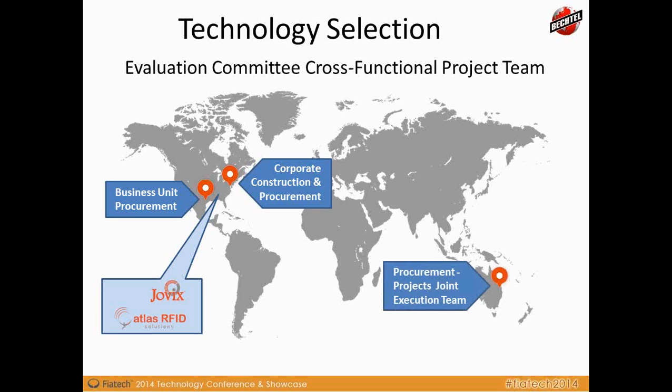One of the strategic exercises that we undertook on Curtis Island was that even though we have very distinct clients, and as you saw from the Google Earth image, the locations are quite different on Curtis Island, the idea was to set up the joint execution team so that we could streamline certain key activities, procurement being one of those, that would supply across all 3 projects.